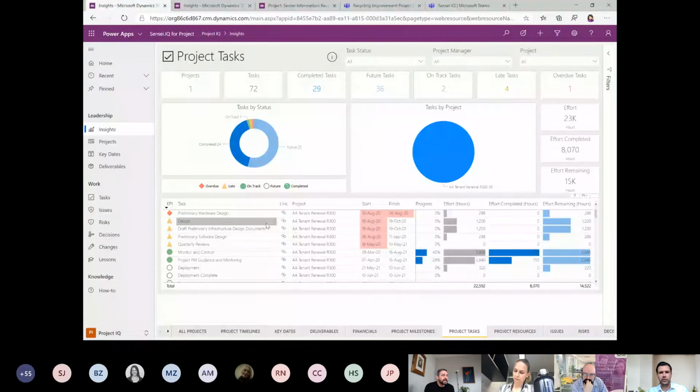Some things to highlight here for you. Some start and finish dates, these are past. And it looks like we have some remaining hours in here that can't be like this. This is finished now, so this should be all in the future, which means this can't be done. I can see this is marked as overdue, so it looks like we're behind on some of these tasks. What would you get from this, and how would you try and look into what's behind this being off track?